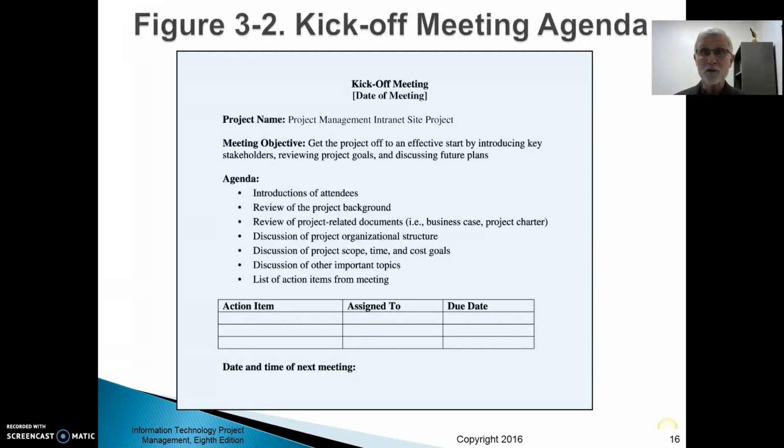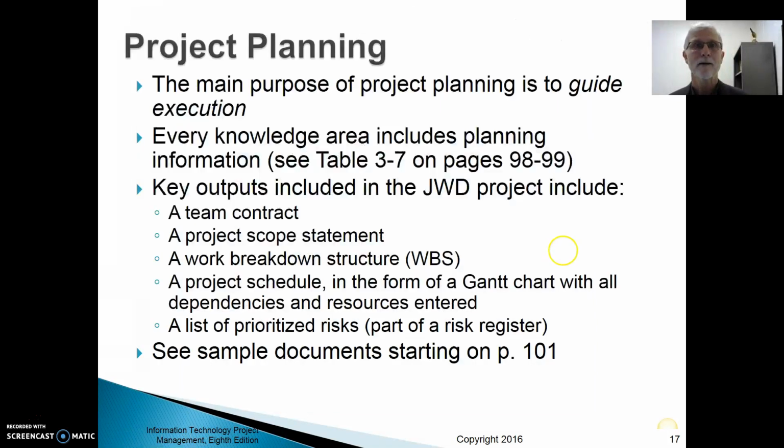There may be open issues from this kickoff meeting that still need to be addressed before you can start the project. You want to track all those action items and make sure they're documented and everybody agrees to these action items and these due times. The key here is making sure you assign that action item to somebody and hold them responsible. Having an action item and not giving it to anybody means the work ain't going to get done.